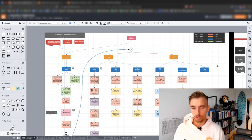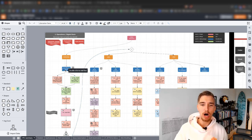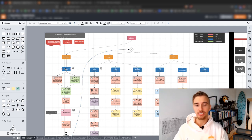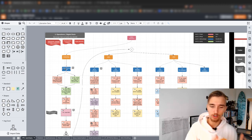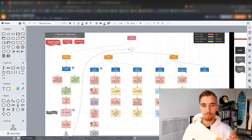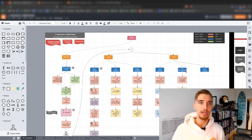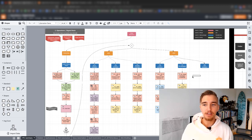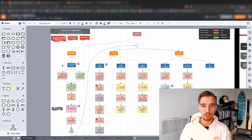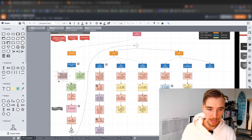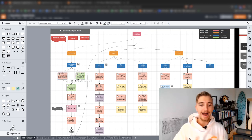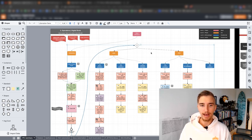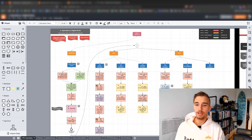Then we have work packages — these are essentially a condensed box that explains the work we're about to do, broken out below. This is level three: Trello and Sheet setup. When we onboard a client, we get them in Trello and in our Google Drive shared folder. Then we have level four, which is the dimension that everyone gets tripped up on and they start using Word docs and Google Sheets. This is the activity that needs to get done to accomplish the work package. You can see these are verbs — actions like input, setup, launch, draft. We don't have any verbs in the work packages and we don't have any verbs in the phases.